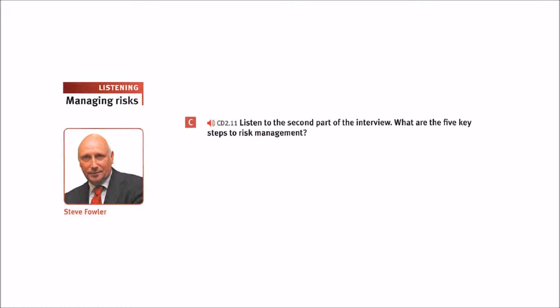Only at that stage does one then go on to assess and prioritise risks. Point 3. After identifying risk, the next stage is to assess and prioritise those risks. Now, a useful tool to recording prioritised risks is called a risk register. It's a way of an organisation recording those risks that are most critical to the organisation, and more importantly, what the organisation is doing about those risks, when they're planning to do it if they haven't started yet, and who owns the risk.